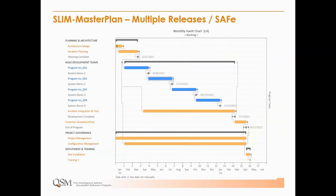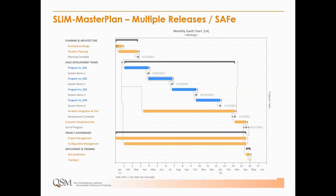SLIM Master Plan models scaled Agile methods. I did a webinar on exactly this a couple of years ago, available on our website. What you're looking at here is several program increments — estimated in SLIM Estimate and pulled in here. SLIM Master Plan allows us to account for other parts of the project or program that may not be software but have a schedule or cost impact, and to handle dependencies — particularly in very large organizations doing scaled Agile, where there can be many dependencies.